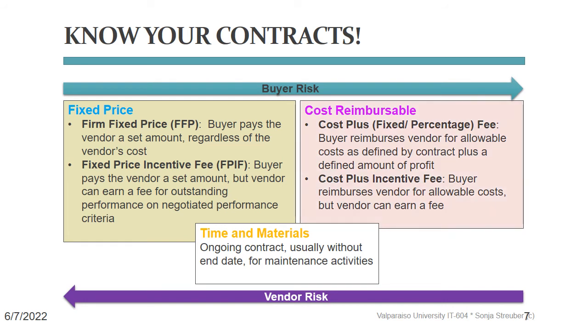In a cost reimbursable contract, you and your supplier need to agree to a list of tasks, possibly even a separate work breakdown structure that you will pay for, and conversely, what you will not pay for because it's out of scope. Then the subcontractor is allowed to charge work time only against those tasks, which are then called allowable tasks, and send you a bill every week or biweekly or every month with a progress report.